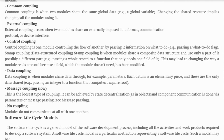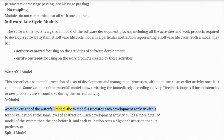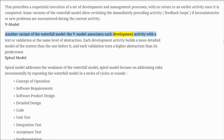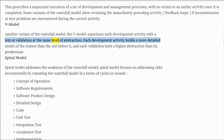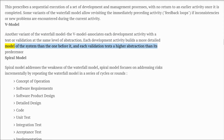V Model: another variant of the waterfall model. The V model associates each development activity with a test or validation at the same level of abstraction. Each development activity builds a more detailed model of the system than the one before it, and each validation tests a higher abstraction than its predecessor.